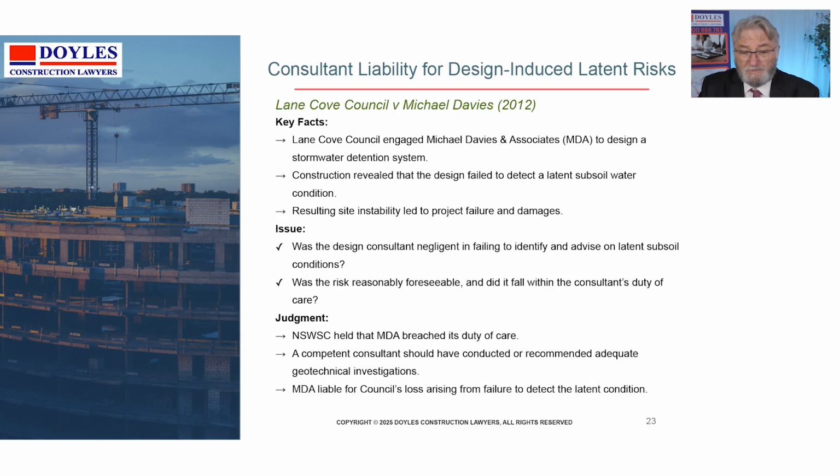This is another case where you've got consultant liability for a design-induced latent condition. Here, the Lane Cove Council engaged a consultant to design a stormwater detention system. However, construction revealed that the design failed to detect the latent condition. Obviously, it had been set up to go in a direction where the ground wasn't strong enough to support it, and therefore it fell away, the contractor had to expend monies to protect itself, and the principal was exposed.